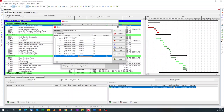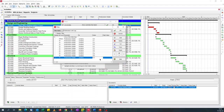This will capture SS and FS relationships with lag. For leads — negative lags — it's simpler: we just add a condition containing a minus sign before the number, so one condition captures all negative values.